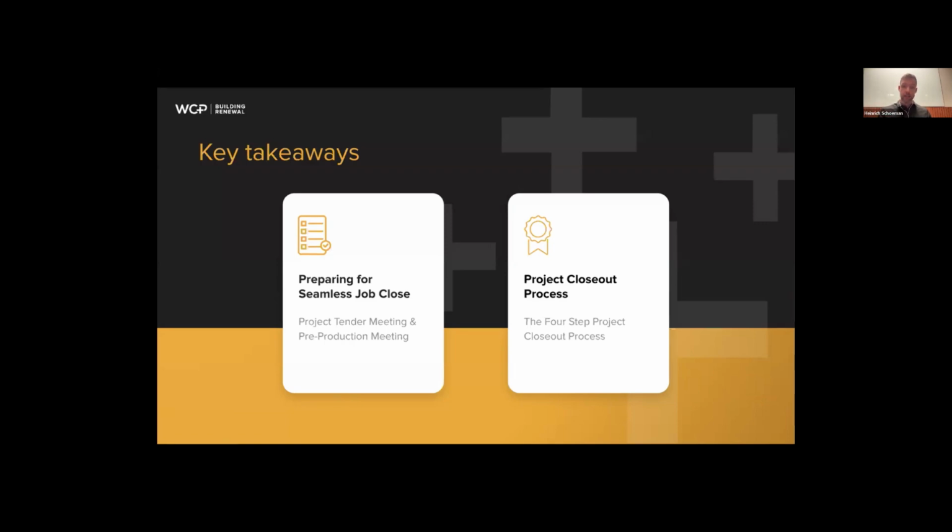Second piece, the ownership gets involved, right? Has their quick review, sends to the contractor any deficiencies or any issues that they see. Those get addressed. Tick. Next, the final walk around in person. Everyone comes together. You're taking care of that, identifying any final items that need to be addressed. They get addressed. Tick. And the demobilization.